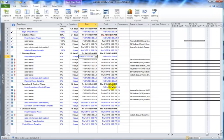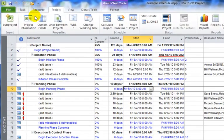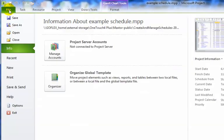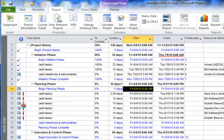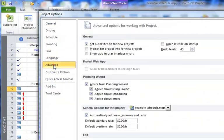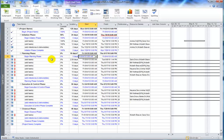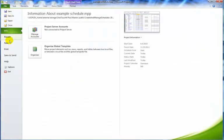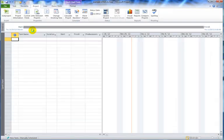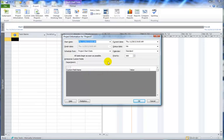To make sure you always set the project start date when you create a project file, you can set Project up so that automatically when you create a new file, it will prompt you for that information. Go to the File tab, select Options, and from the Advanced Feature category, you'll see in the General section an option for Prompt for Project Info for New Projects. Click OK to close the Project Options dialog box. Then when you go to File and select New and open a new project file, the Project Information dialog box will automatically open.